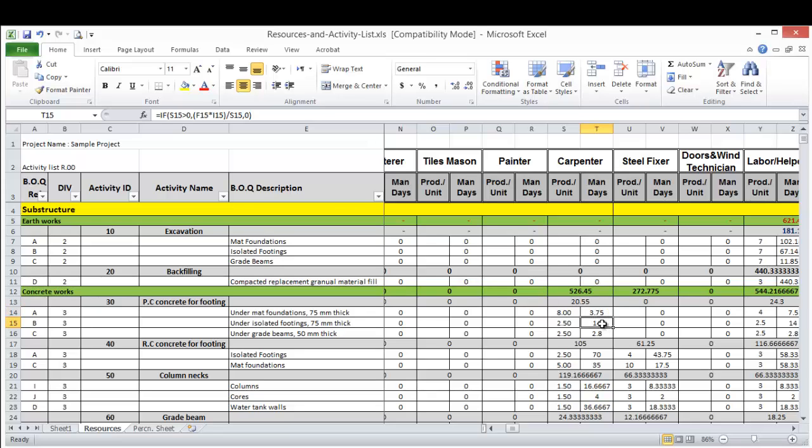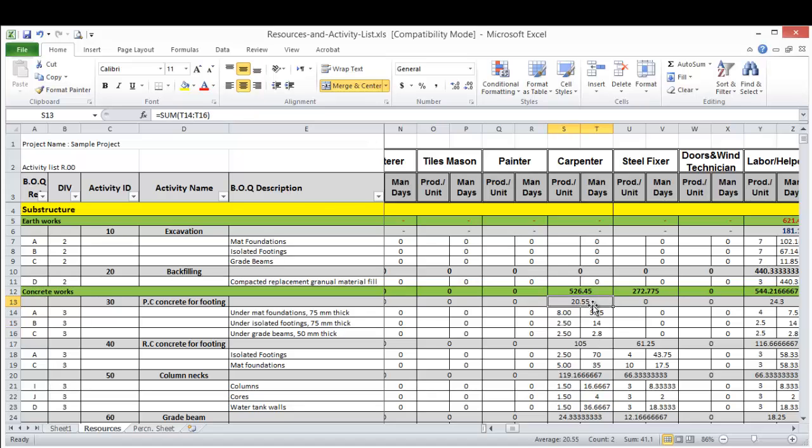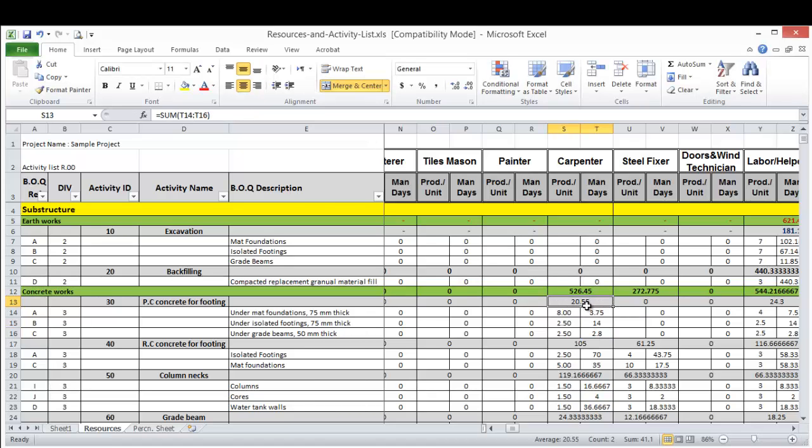So simply put the productivity here and the formula we talked about will calculate how many man days required to execute this activity. Then here you have to have the submission of this all man days and this is the total number you will add in the Primavera.